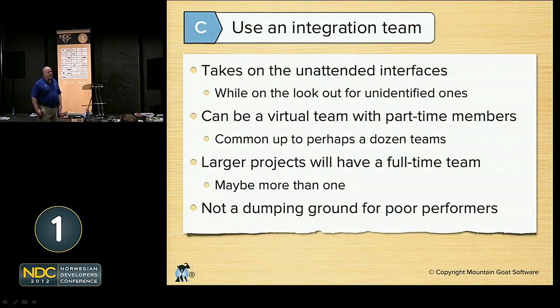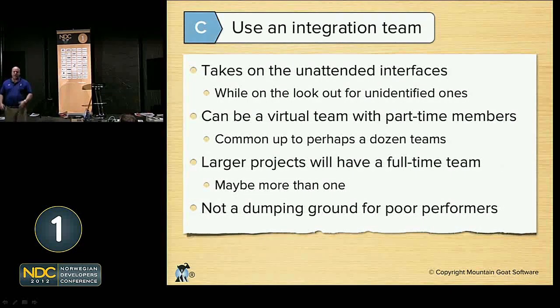Right? Sometimes when we scale Scrum up, we need to introduce an integration team. Often the integration team can be a virtual team. Let's say we have 5 teams, each doing their own good work, but they're all building something together. We create a virtual integration team. What that would mean is we have one person from each of those teams, and they get together in the morning each day and talk about any integration issues. One of the best things to do would be to have an integration test that runs at night. Right? It runs at night, checks for interfaces between the code. Right? If it finds any problems, that build breaks.